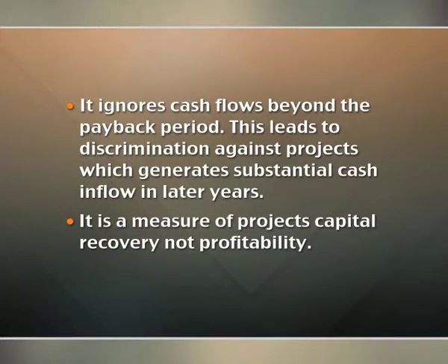It ignores cash flows beyond the payback period. This leads to discrimination against projects which generate substantial cash inflows in later years. It is a measure of a project's capital recovery, not profitability. It measures a project's liquidity. It does not indicate the liquidity position of the firm as a whole, which is more important.